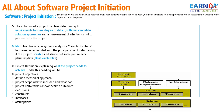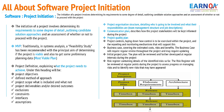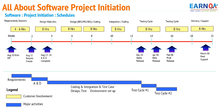The MVP explains many things: the scope, constraints, interfaces, exclusions, assumptions, risks, major requirements, parts, the core team, roles and responsibilities, and contact persons — everything. Together, we plan for an MVP. Once done, it gives dates: Release 1 on certain dates, Release 2 on other dates, with defined time boxes for each deadline. This creates clarity about what we will work on, how long it will take, and when we will hand the project to the customer.